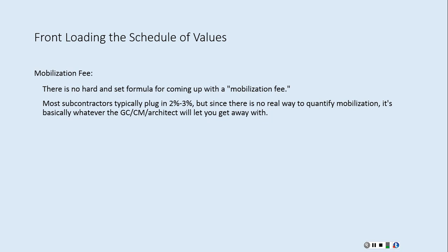Equipment could be the same thing, but usually that's spaced out enough that by the time we get something delivered, we're able to get paid for it prior to the bill coming, but that doesn't happen all the time. When we think about it, we incur all kinds of expenses on a job site, and quite often we have to wait until the next month in order to get paid for the fruits of the work for the prior month.